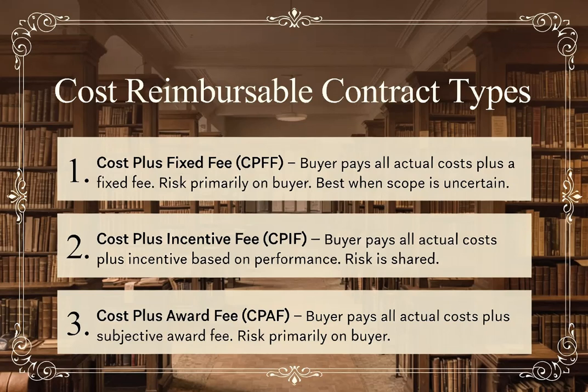Cost plus award fee contract, or CPAF. The buyer pays all actual costs plus an award fee based on the buyer's subjective evaluation of the seller's performance. Risk is primarily carried by the buyer, best used when performance is hard to measure objectively.